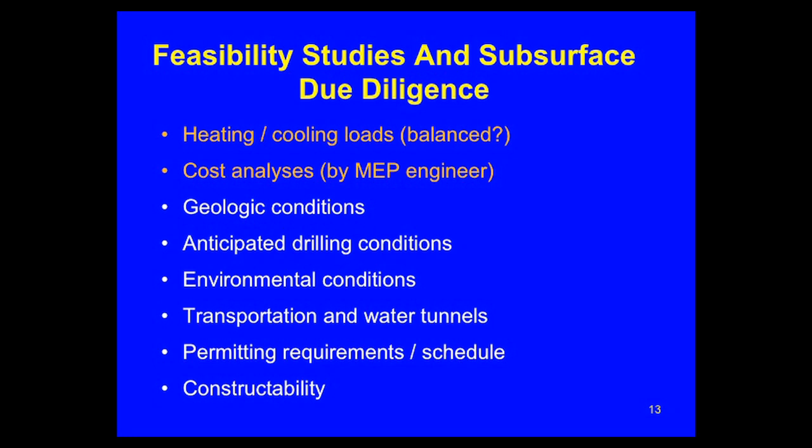They would be able to compare a geothermal system to other conventional systems, to a high efficiency gas boiler, to an air to water exchange for cooling. And they will do a comparison and make a determination what the payback period would be for spending that extra money to drill holes in the ground and stuff like that.